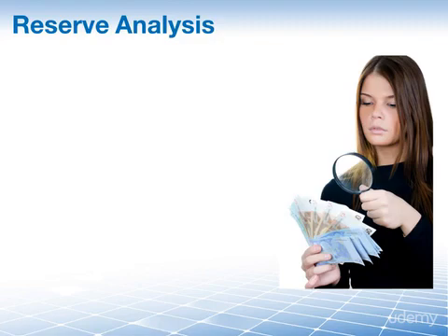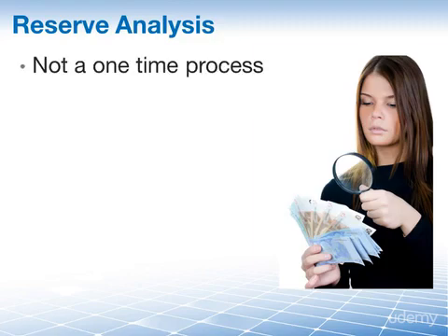For the household budget and also for our project budget, looking at our reserves is not a one-time process. You perform a reserve analysis when it makes sense. This might be periodically at the end of each quarter or year, when there is a significant change in circumstances, or at a significant milestone, when reserves should be revisited as part of the control costs process.